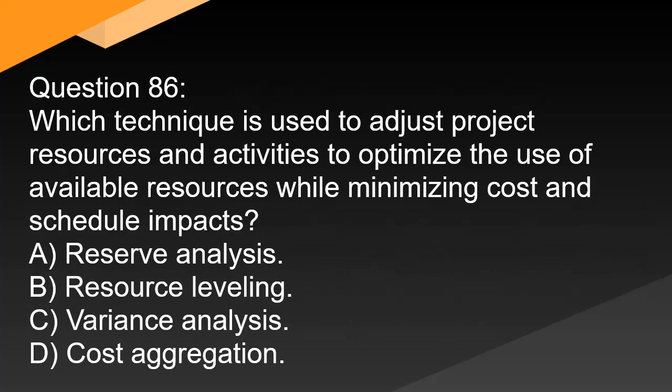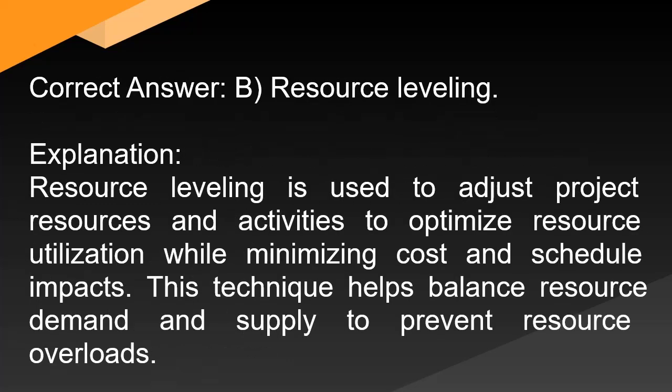Question 86: Which technique is used to adjust project resources and activities to optimize the use of available resources while minimizing cost and schedule impacts? A. Reserve analysis. B. Resource leveling. C. Variance analysis. D. Cost aggregation. Correct answer: B. Resource leveling. Explanation: Resource leveling is used to adjust project resources and activities to optimize resource utilization while minimizing cost and schedule impacts. This technique helps balance resource demand and supply to prevent resource overloads.